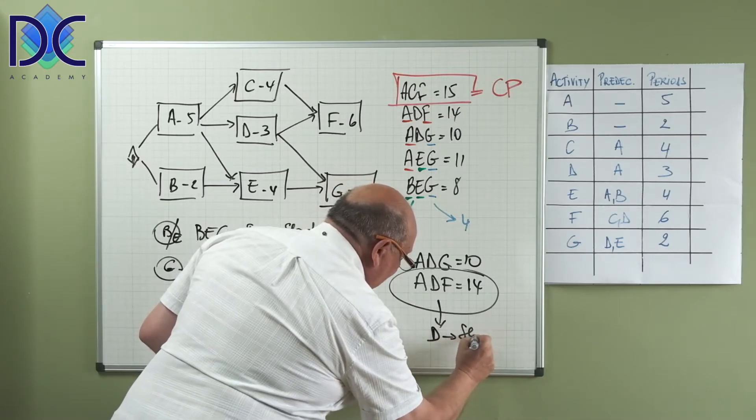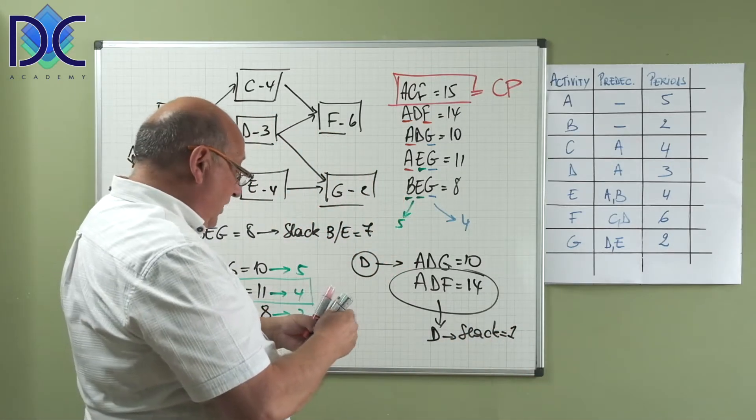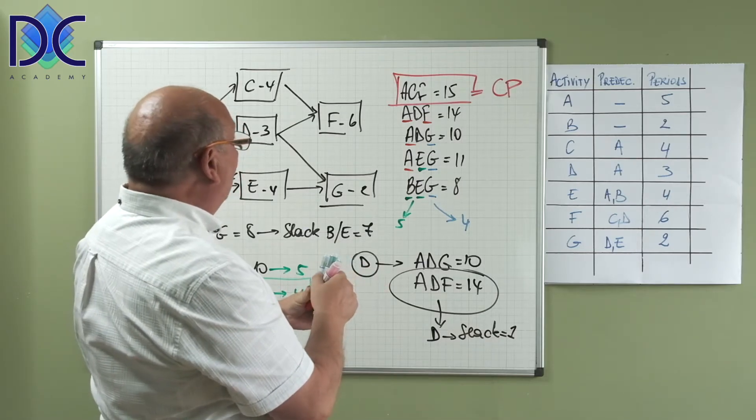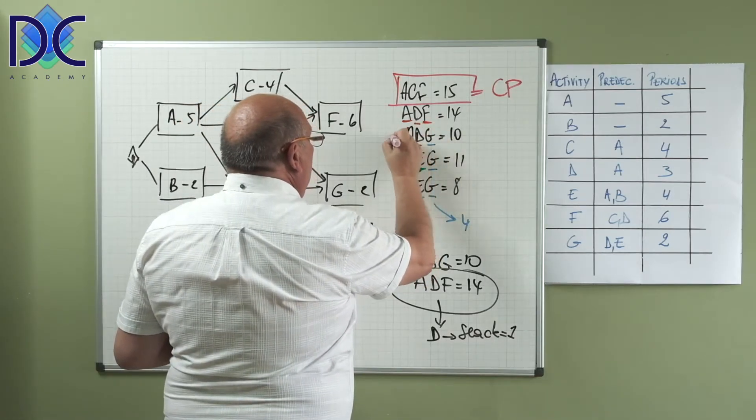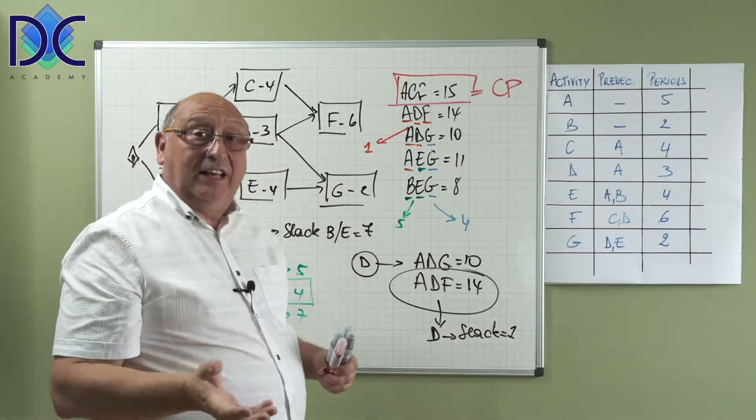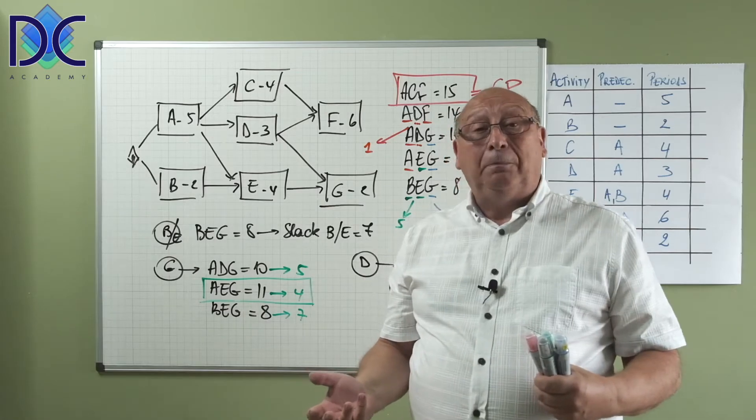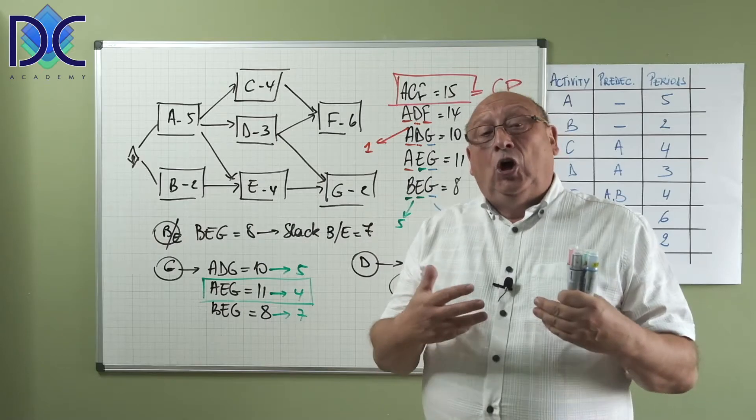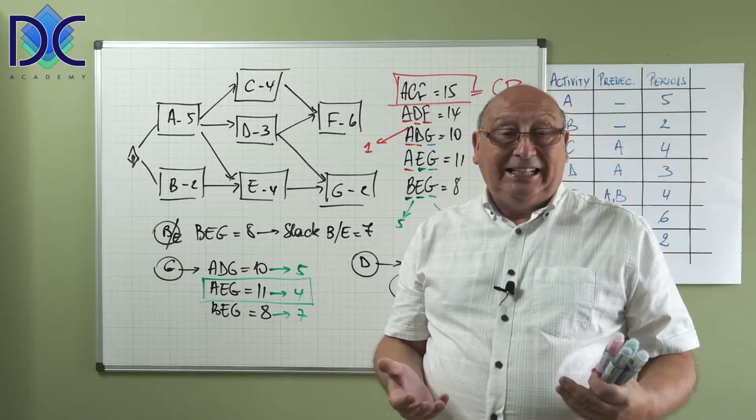D has a slack equal to 1. So now we have all of them. Basically, when we have activities which are not on the critical path but are on different paths, we have to find the longest path on which that activity is and then compare it with the critical path.